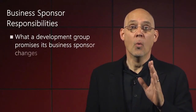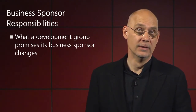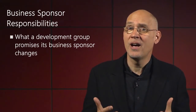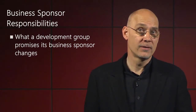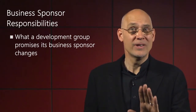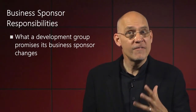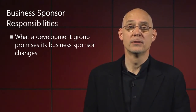Also, what a development group promises its business sponsor changes. Unlike traditional development processes, an Agile process doesn't try to precisely nail down time, budget, and scope of work at the start of a project. This can feel alien, especially if you're dealing with an outside development firm. Most business sponsors are used to contracts that specify a fixed set of features built in a fixed amount of time for a fixed price.